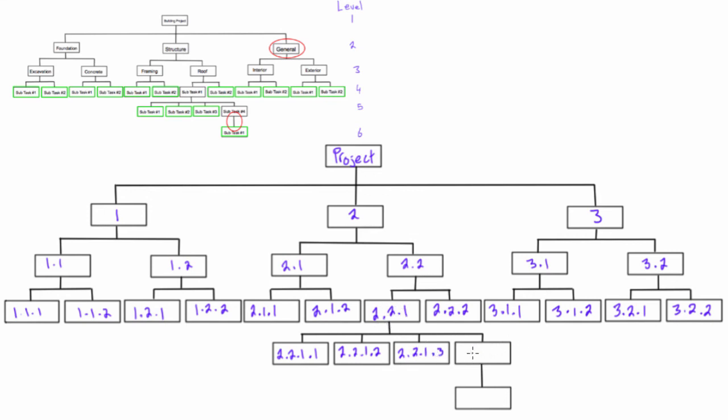And lastly, if we drop down to the next level, the sixth level, we would carry this whole thing down and just add .1 because it's the only one. So we would get 2.2.1.4.1.